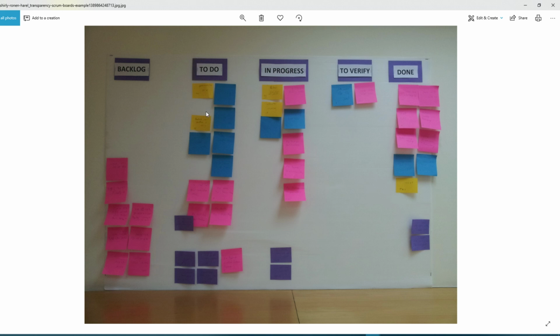And then you would move the things you're currently working on into a column called in progress, and that means you're currently working on that thing. When you're done, you move it over to the done column. And so there were these three columns that appeared with this task management system: the things I have not done, the things I'm currently doing, and the things I've completed.